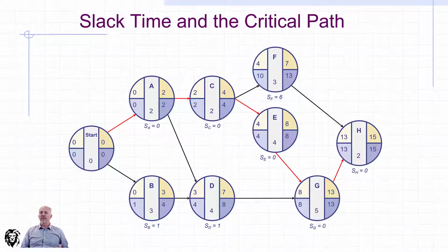Now, this is the critical path method. This is how it was developed. It works using the network diagram, but it gets really, really useful when we put it on to our Gantt chart, because what we really want to get a better feel for is how we can use this slack and how it interplays with the activities around it to inform our flexibility when it comes to non-critical activities. Critical activities, we know that we want to do everything we can not to delay them, give them the priority so that our overall project is not delayed.